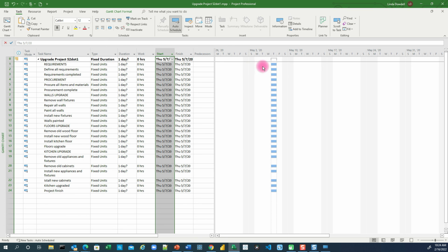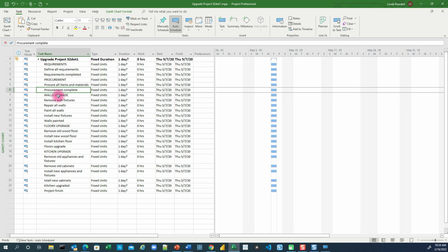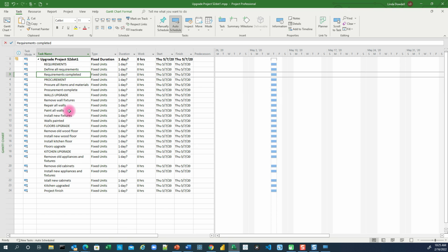And lastly, the Gantt chart with the time scale displays a short horizontal bar on the right with the light blue color to represent a 1 day duration. And when we convert the task to milestone tasks, you're going to see a triangle listed on the right-hand side, meaning on the time scale.